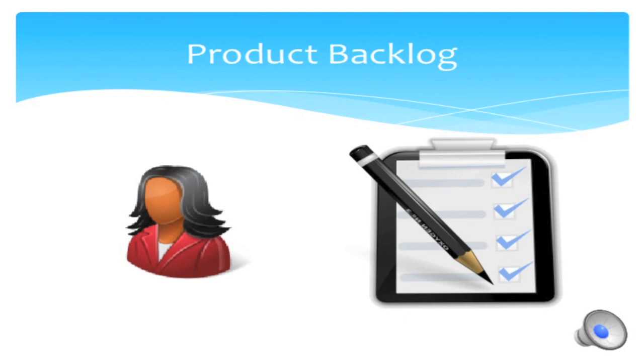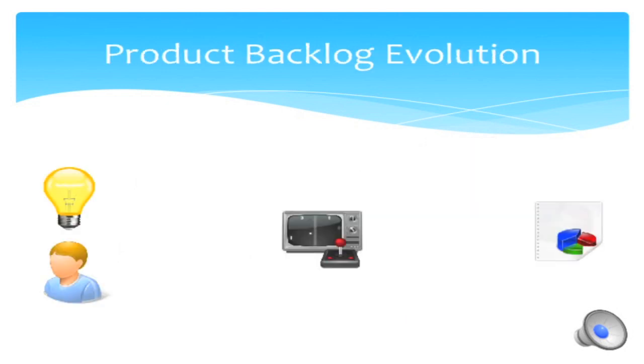The product backlog is constantly evolving, and the Scrum team fully expect it to change during the life of the project. This may be due to stakeholders getting new, exciting ideas, new technology being introduced, or perhaps market conditions changing. Whatever the reason, we know and expect that the requirements will change. It's why we don't put a massive amount of effort into detailing requirements up front.